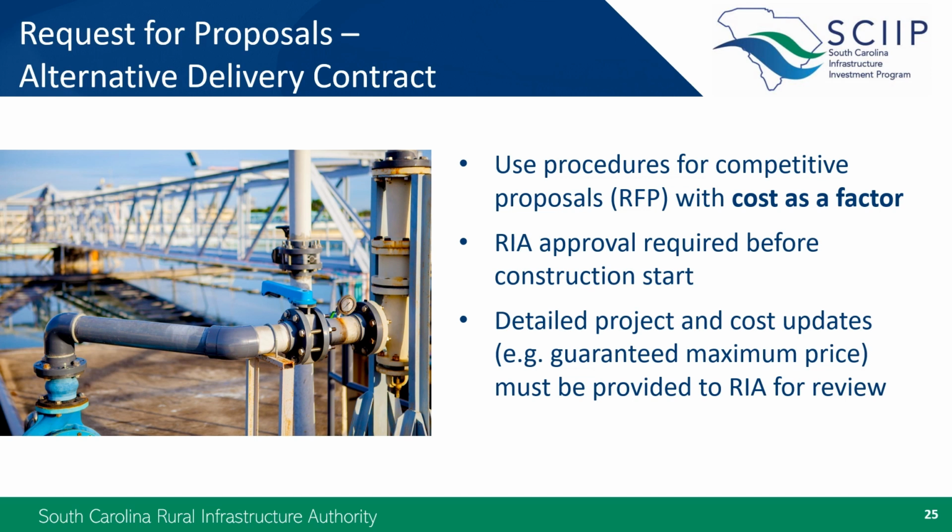If you're going to use this method, you should expect to be in frequent contact with your grant manager because we'll require detailed updates on the project, particularly the cost, as it progresses. For example, we would expect to review prior to posting an RFP, after receipt of proposals, prior to execution of a design contract, at each stage of the guaranteed maximum price, and again prior to execution of the construction contract.